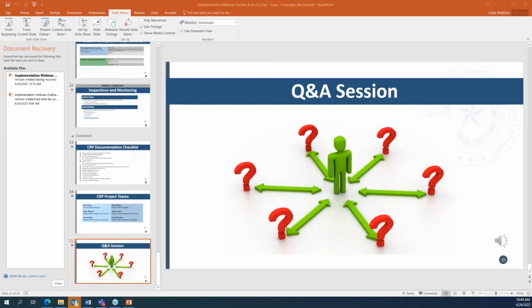But we have included in the contracts what would be considered pre-contracting costs, such as pre-award and then post-award but prior to the contract. So just know that all the work that's being done right now, if it was procured correctly, of course, would all be reimbursable. And in the next meeting for the draws, we'll be going over what the turnaround time would be for us reimbursing these projects.